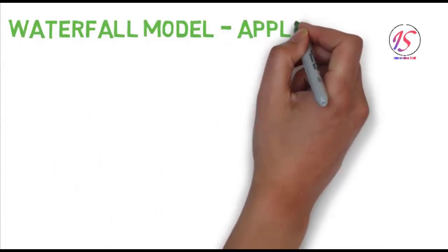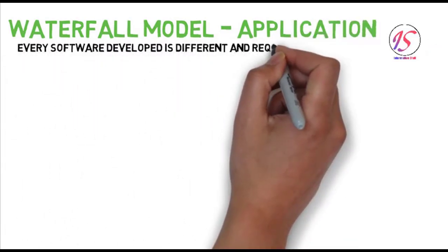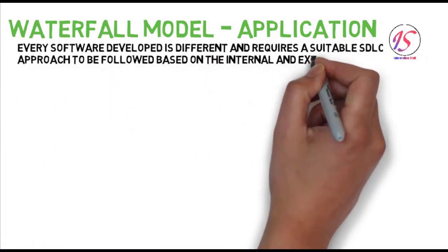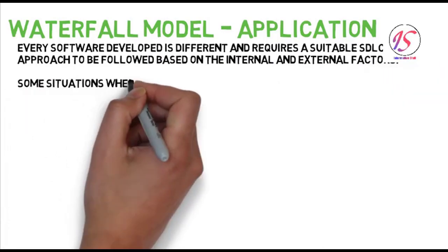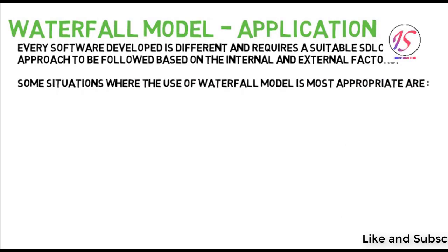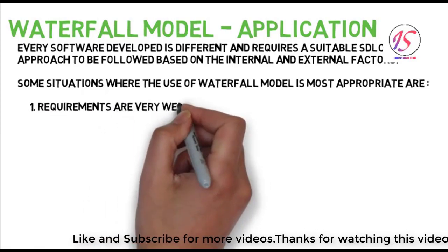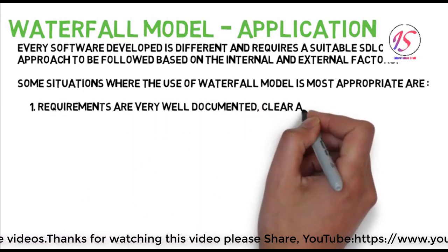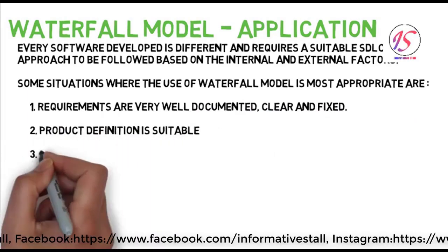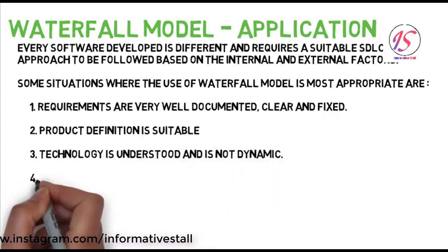Now we are going to discuss waterfall model applications. Every software developed is different and requires a suitable SDLC approach to be followed based on the internal and external factors. Some situations where the use of the waterfall model is most appropriate are: the first one, the requirements are very well documented, clear and fixed. The second, the product definition is stable.